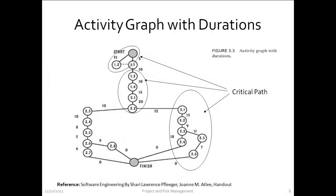This slide shows activities in a project connected together in what is known as an activity graph. The edges represent activities and are labeled with time estimates for each activity. The time units are in days for this activity graph. The nodes denote the ends of each activity and are labeled with the activity number.